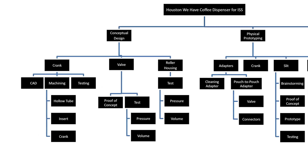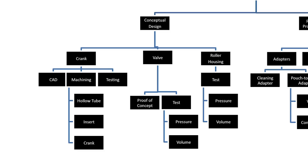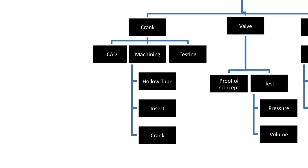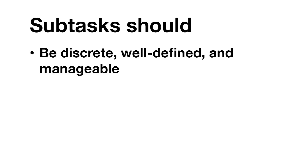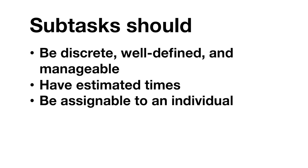In the conceptual design, they were designing a crank, a valve, and a roller housing. In looking at the conceptual design of the crank, the team further subdivided it into individual sub-tasks. When making a work breakdown structure, you want to continue to divide your tasks until you have very discrete, well-defined, and manageable sub-tasks. These sub-tasks can then be used to estimate how much time they will take, as well as to assign them to an individual on your team.